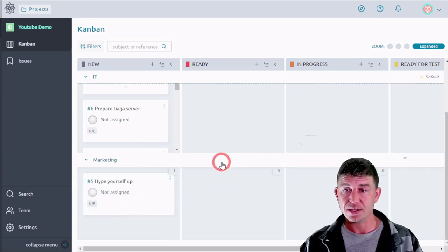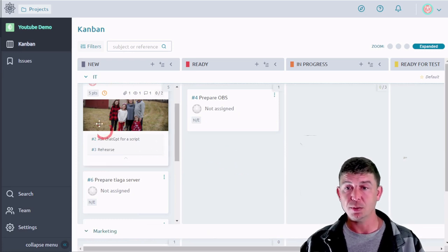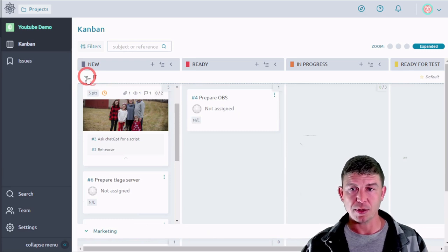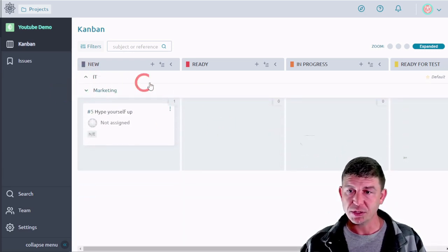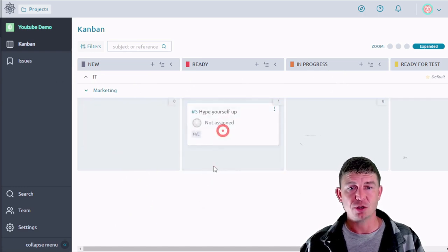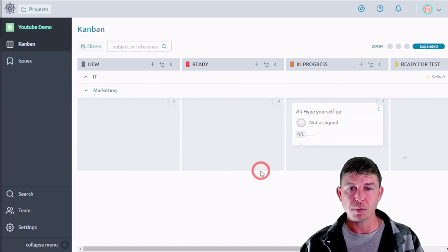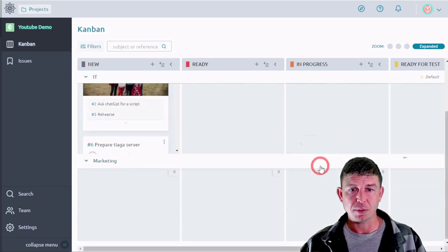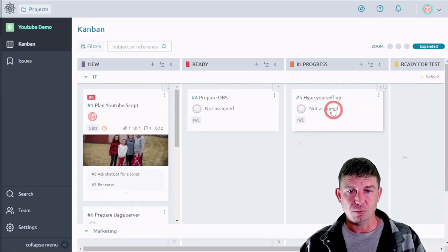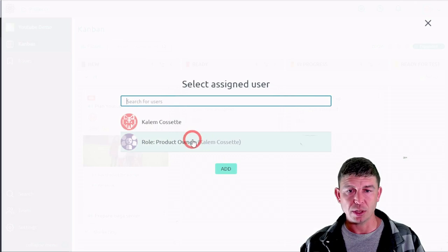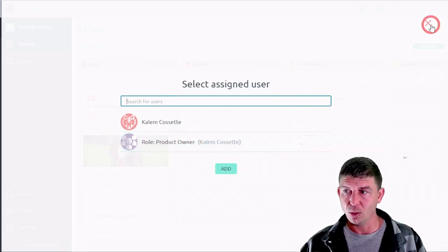This is a good way to keep track of who's doing what if there's subordinate or smaller teams working within the project. And if you're mostly concerned with just one swim lane, you can minimize all the rest and just make sure that your stuff keeps moving through your swim lane. But if something needs to move to a different swim lane, it's not hard to move it to that swim lane. I would also recommend that if you move it to a different swim lane, you also associate it with the appropriate assignee or role.